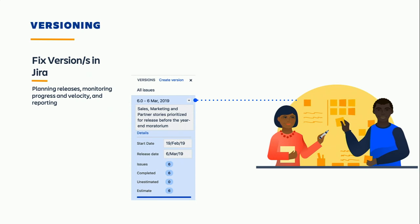in addition to what the Confluence could offer, especially because they are the key stakeholder in a project, and they are responsible to manage expectation between the customers, the other stakeholders, the development team, release management team. So they really wanted to have the authority to decide when a story has to be released. So they wanted a feature so that they can actually go and communicate to the entire team that, hey, I want this particular story to be released on this particular date. Because you can work on stories which you don't want to release now, you can release 3 months down the line because it could be related to a product launch or something.